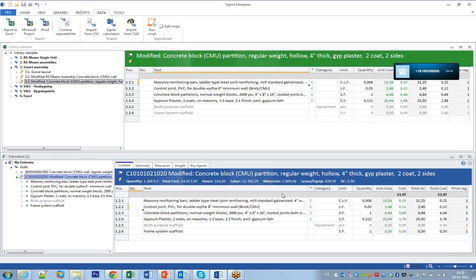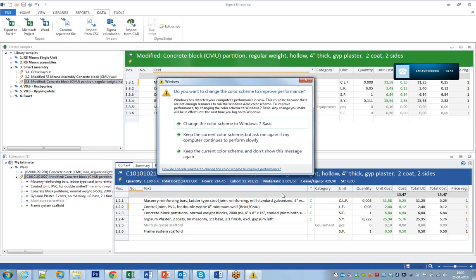One I can think of, and it's hard to explain: if I'm a general contractor taking prices from subcontractors on about 90% of my work, I'd want an assembly where I just say, I need to take a price from electrical, I need a price from framing, I need a price from a roofer, and once I click all those yeses, it builds my spreadsheet of all those subtrades so I can start taking prices for each of them.